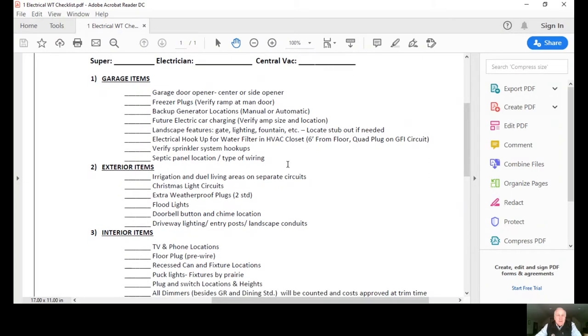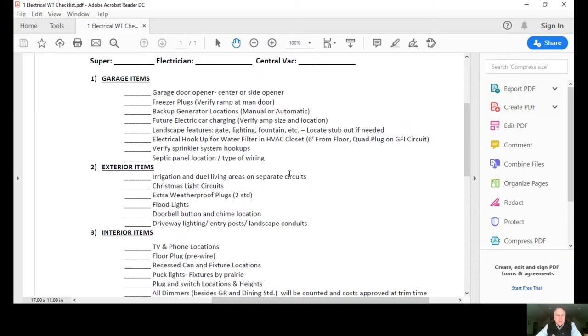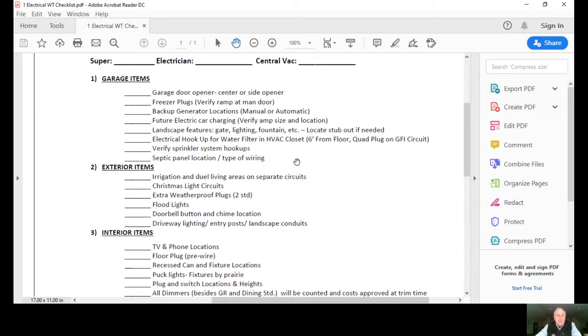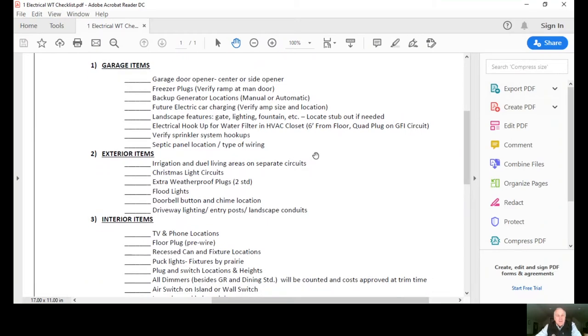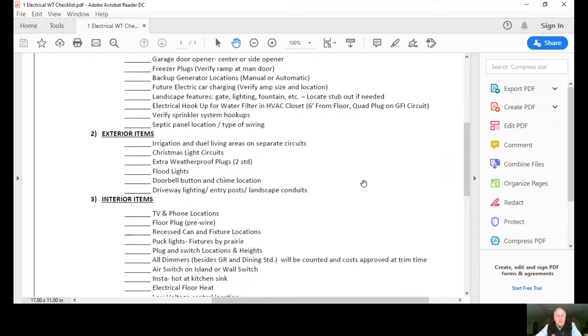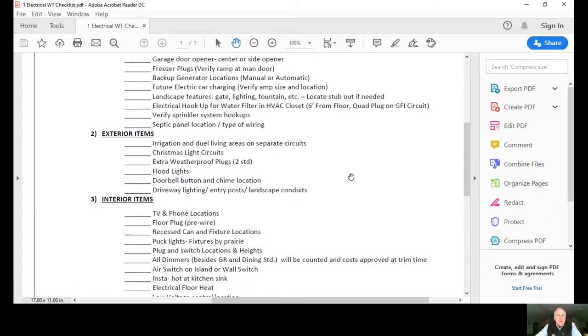In the mechanical room, we'll address the electrical hookup for water infiltration. So if you want to filter your water or any type of a system like that for water, we want to make sure we're setting up the electrical properly. Verify the sprinkler system hookups, and if it's on acreage, the septic panel and type of wiring.